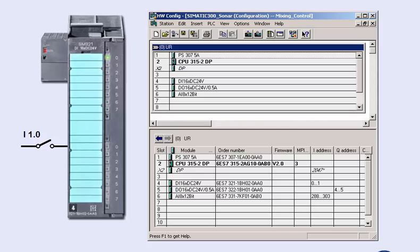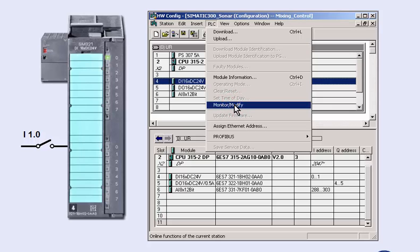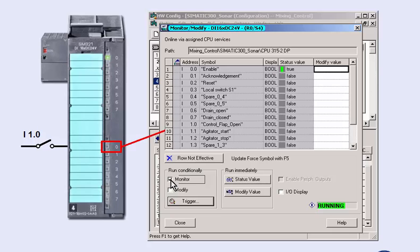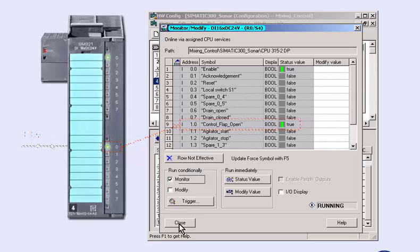Thousands of signals, as occurring in complex plants, can be checked quickly and reliably. We select the digital module and open the dialog for the input signals of the module via the menu item PLC Monitor Modify. We select the monitoring mode and can now monitor the switching operation in the plant directly from the programming device. This enables you to check the signal path, for example from a mechanical end position switch, over the module, up to the process image input and output table of the CPU.